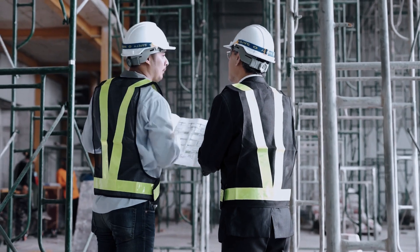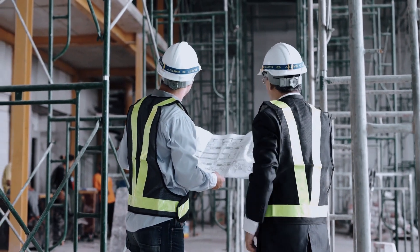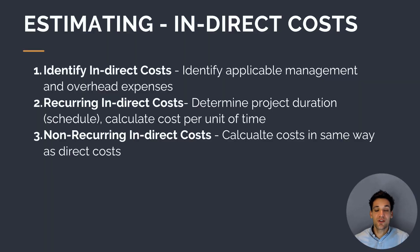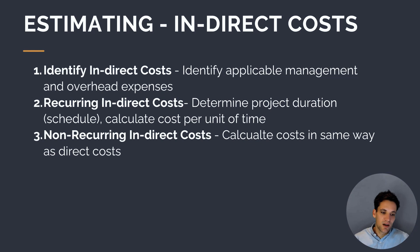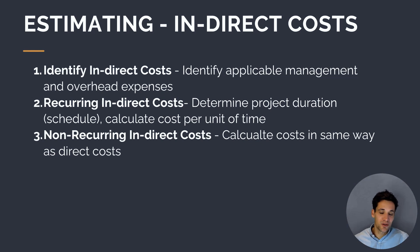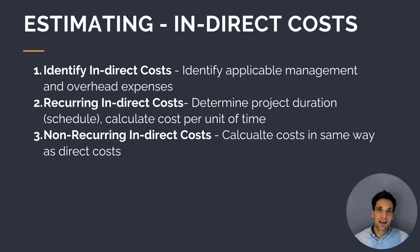After calculating our direct costs — the costs of all physical construction activities — we move on to calculating our indirect costs, the costs to supervise and manage the works. We first identify all applicable management, supervision, and overhead costs. We then calculate our recurring indirect costs: based on the duration of the project, what are the ongoing costs we need to incur? These include staff salaries, temporary fencing, a security guard at night, or hiring a forklift for offloading materials. We also calculate our non-recurring indirect costs — the one-off costs like setting up site facilities — in a similar way to how we calculate our direct costs.